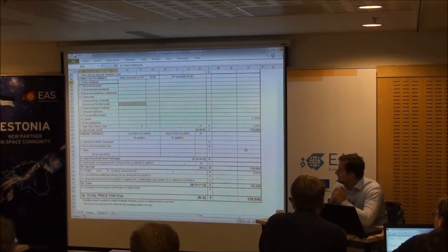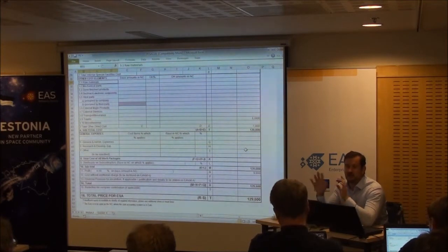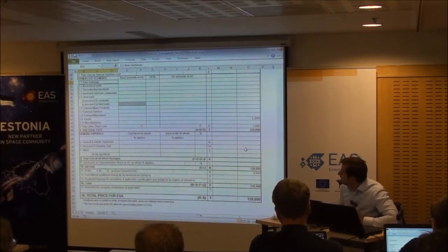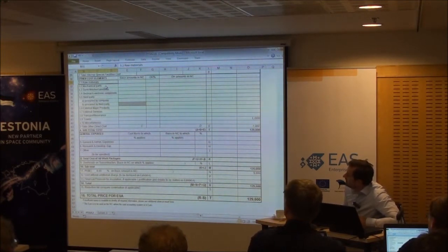In most cases, you're inter-country trading anyway, so there won't be any. ESA itself, if you look in the STCs or the cover letter, it'll state that, and they usually even point you to where their exemption certificate is, because you simply don't charge them any VAT.